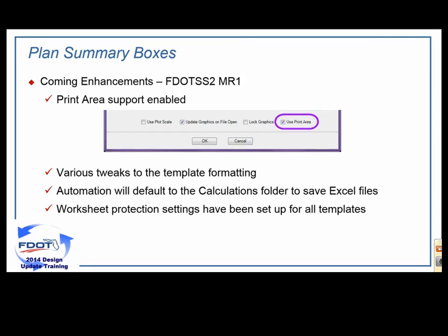This is brand new, so what we're going to be asking you to do, as the last thing before those files go out, is to lock the Excel files so that there isn't any confusion or mix-up or mistakes once it gets into construction. All right.